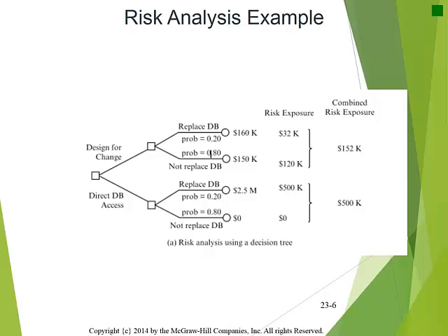For each option, add a new branch to the root of a decision tree. Label each branch with the name of the option. For each possible outcome, add a new branch at the tip of the option branch. Label each new branch with a possible outcome name, its loss probability, and its loss magnitude.